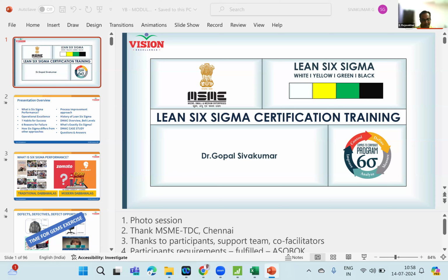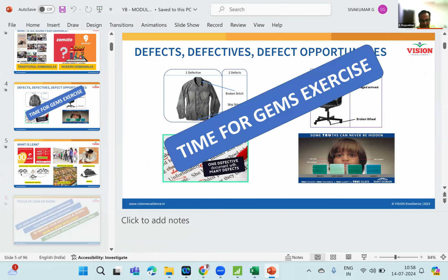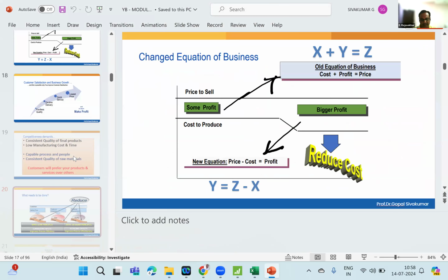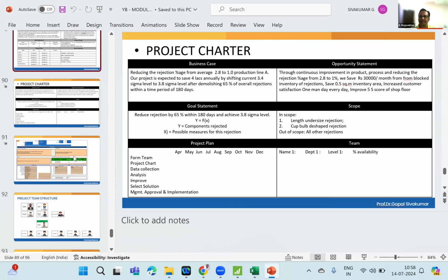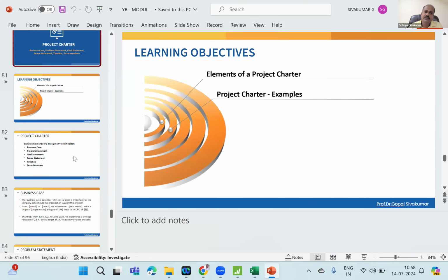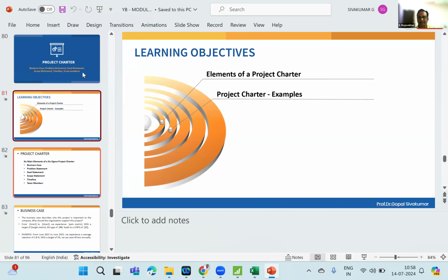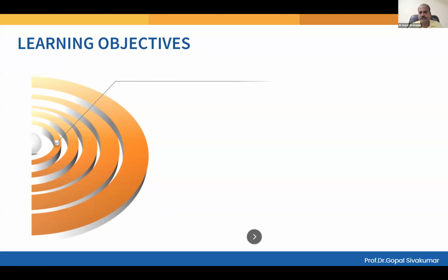Sir, you told that for the rejection rate there should be a measurable task in the company. Our company has a software called Trackwise where we record the deviations every now and then as metrics. So that suffices for implementation of Six Sigma. Yes, if the required information is available. Because some companies do not have that measurement. So how are they measuring the defects? If such practice doesn't exist, then you have to allot time to collect data.